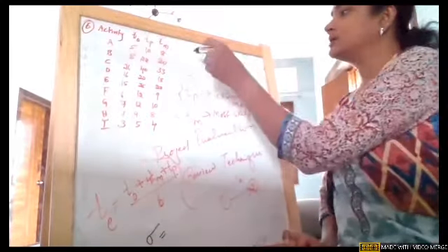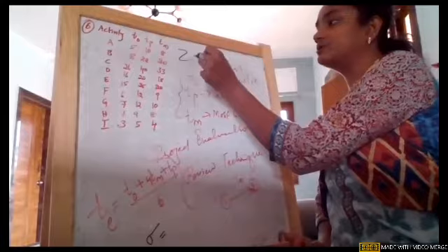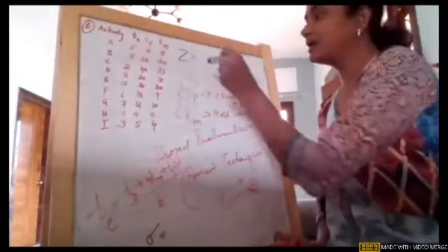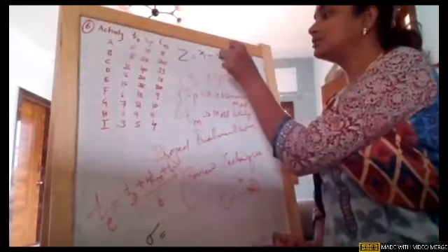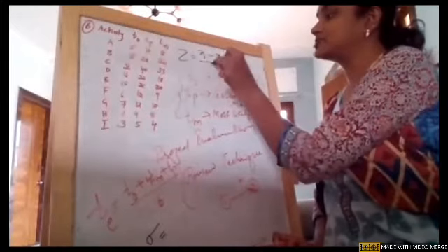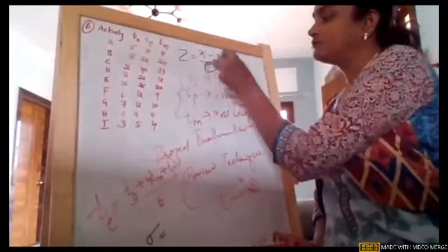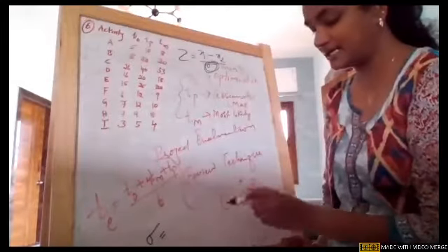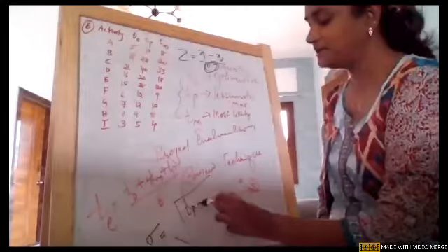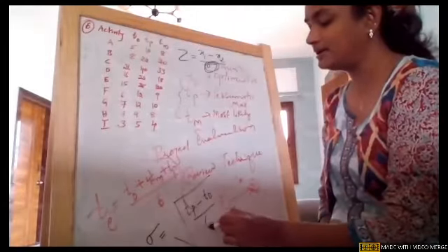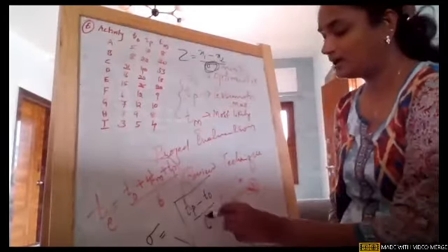If you remember normal distribution from your statistics, we used to memorize x1 minus x2 divided by sigma. For this, we need to calculate sigma. The formula for this is sigma equals TP minus TO divided by 6.